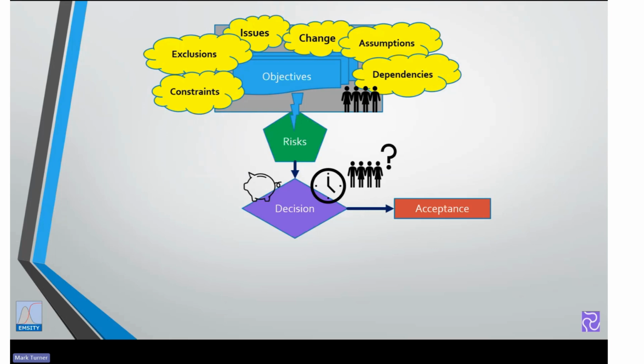However, we would still want to maintain our monitoring of it to ensure that the external environment within which that risk operated hasn't changed, because all the time that risks are just sat there in a risk register not being monitored, things can change around and they can suddenly become higher priority than they were when they were originally assessed. Or we decide to take action.